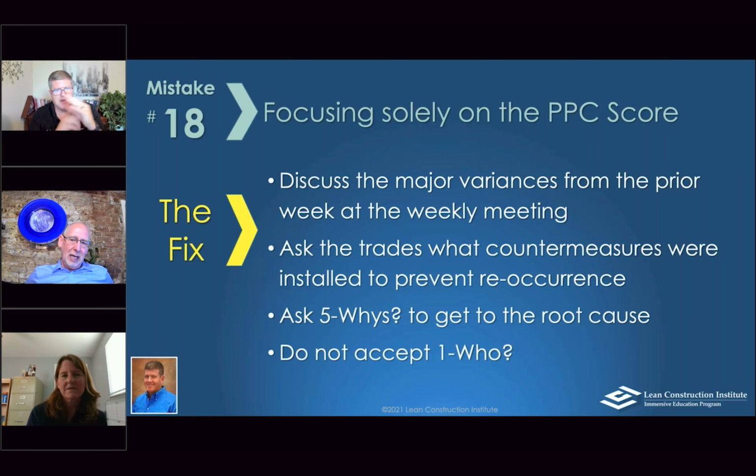Yeah, exactly. Something that you're working towards. Or when they were talking about creating swim lanes, another thing we do pretty regularly is if you have a complicated campus or site, you can have the main building going on, and you have two outbuildings, and you have a whole bunch of underground work being done. Plus, you have this project you're doing along with the Army Corps of Engineers, which is to rework the waterways on the other side of the property, and all this stuff is going on concurrently. And so we have swim lanes for each one of those major effort sequences.